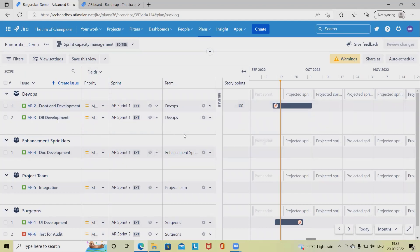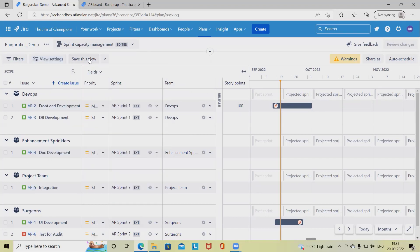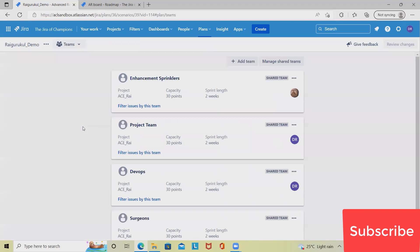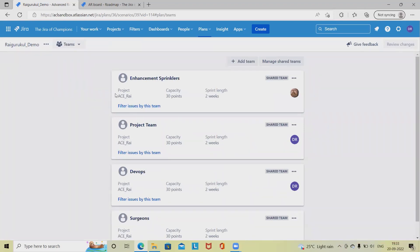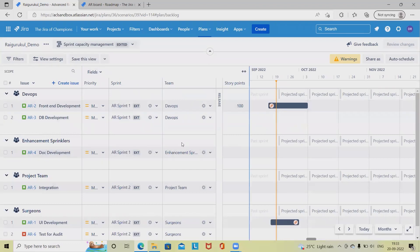That's all from the capacity planning. Let's recap: The first and most important part is that whenever we select capacity planning, we have to do some customizations. Without that we won't be able to use it. The first customization is grouping — either by team or sprint. The second step is adding teams, selecting them, and assigning issue sources. If we don't assign issue sources, we won't get any data on the board.